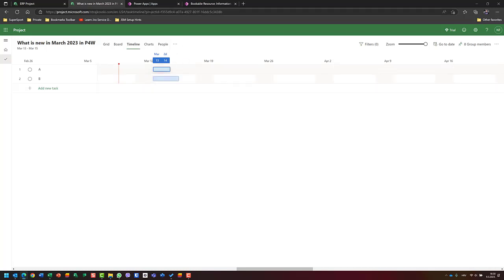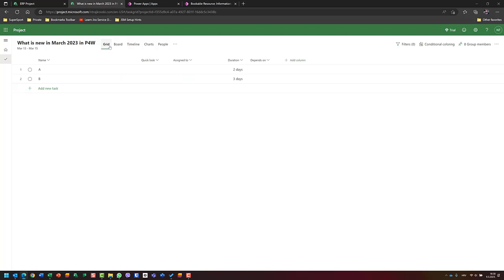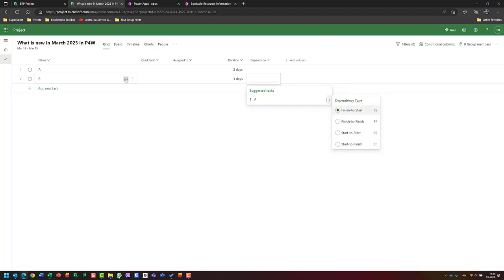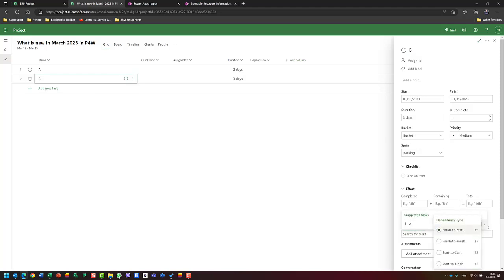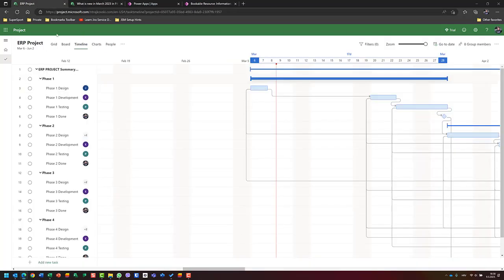So if you want to create your schedule in the timeline, be aware that you can only do finish-to-start relationships there. But if you want another type of relationship, you should go to the task details panel, choose the dependency field, and then select what type of dependency you want. Let's go back to the ERP project.